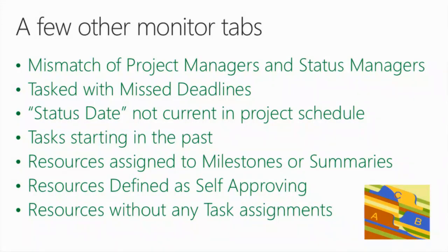Somebody's not getting updates. What happens is some PMOs don't let the project manager create the project schedule. They do it, and then they reassign it to somebody as a project manager. So now you have a mismatch of status managers and project managers. Anyway, that creates a lot of heartache.